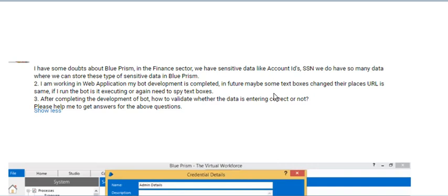The release management team will take care of these change requests from the client. The release management team will give the changes to the development team. Once the development is completed, the operation team will start the deployment. So this is one of the cycles for all the RPA environments. Anything which could change, maybe some Java version update changes, everything would be under the change request.